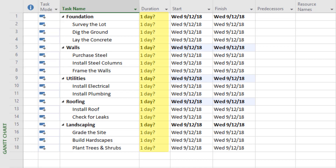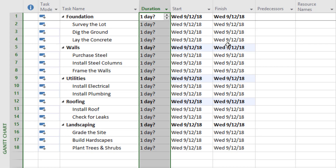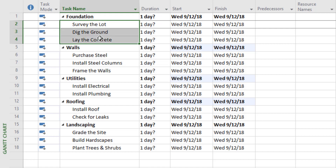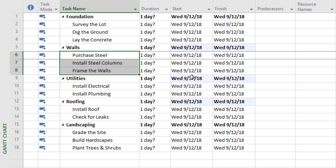The next thing we're going to do is set the durations for our activities — how long we expect these things to take. As a tip, try not to do this just on your own. Involve the project team members, the people actually doing the work, and get their expert input. Your goal is to come up with the best estimate possible. When we record durations, we're only going to do it for the lowest level activities — those things not in bold. The categories themselves are not really work; it's all of the lowest level activities we're going to set durations for.